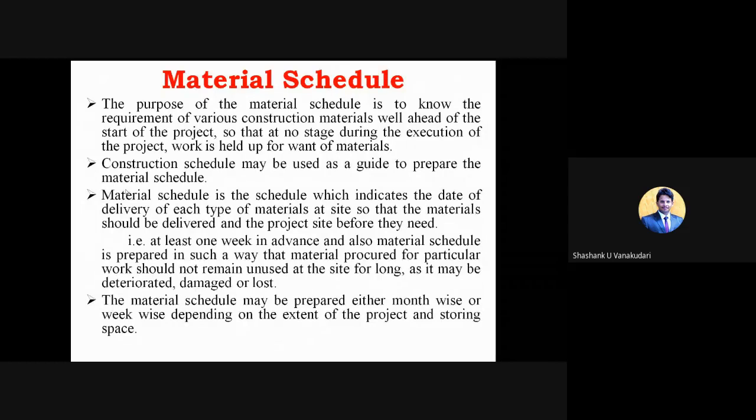Okay, and here the material schedule is the schedule which indicates the date of delivery of each type of material at site, so that the material is delivered to the project site before it is needed. The main advantage of preparing this material schedule is that before starting a particular work, all the required materials reach the construction site.